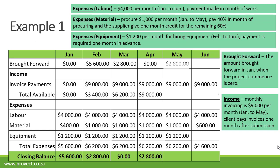Brought forward in May is $2,800 plus $9,000 invoice payments — total available is $11,800, minus $6,200 expenses = $5,600. Brought forward in June is $5,600 plus $9,000 invoice payments — total available is $14,600, minus $4,600 expenses. Our closing balance in June is positive $10,000, which means that this project will make a profit.